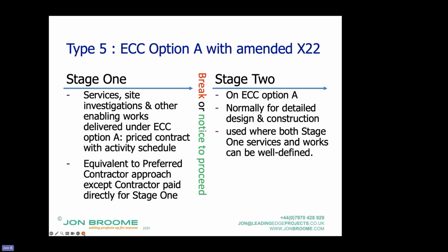And there I can quite see it, because actually a building's a contained unit. They should be able to de-risk it. But for civils contracts where there's rain, weather, physical conditions, etc., and it's long and stretched out, even with a lot of ECI, has it been sufficiently de-risked, especially if it's a big contract? Sufficiently to go option A, perhaps not. So that's becoming back in, but it's not as written.